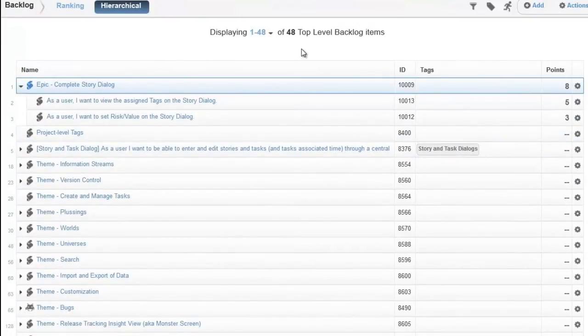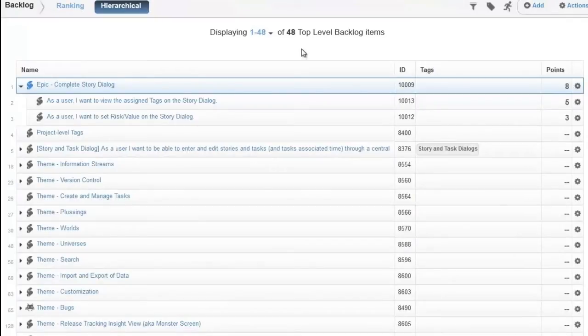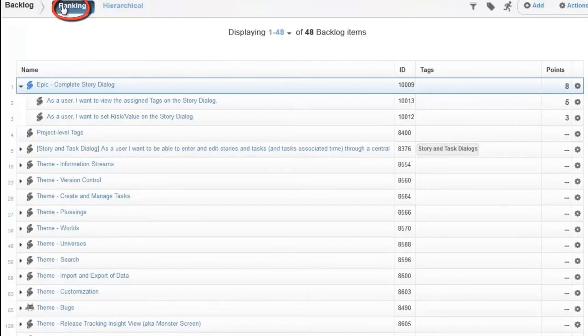Now that we've defined our stories, we can move to the ranking view to define the priorities and get ready for sprint planning.